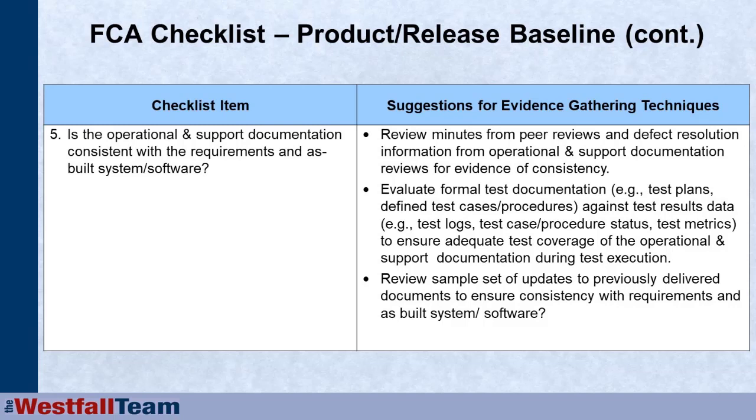We're going to evaluate any formal test documents. For example, one of the things we did during system testing is we actually walked through the user's manual, the operator's files, or the help files, and had test cases and made sure. And so what we're looking at here is, is that test case coverage adequate to test those operational and support documents, making sure that what the software actually does is what the software is supposed to do.